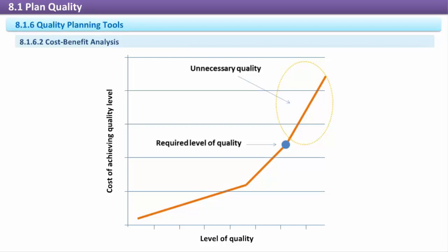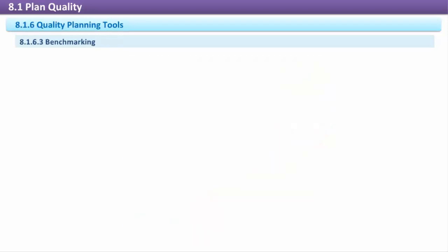customer. Another purpose of cost-benefit analysis is related to continual improvement. As we strive for improving products and processes, we do not want to exceed a point beyond which the costs of the improvements are not offset by the anticipated increase in revenue, sales or profits. This type of analysis is called marginal analysis.